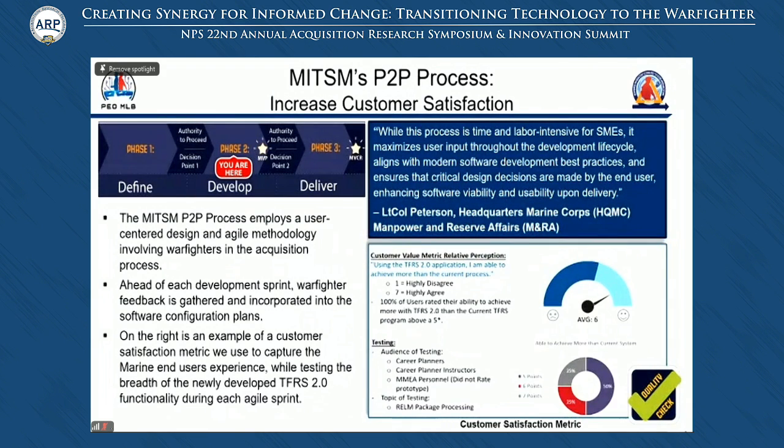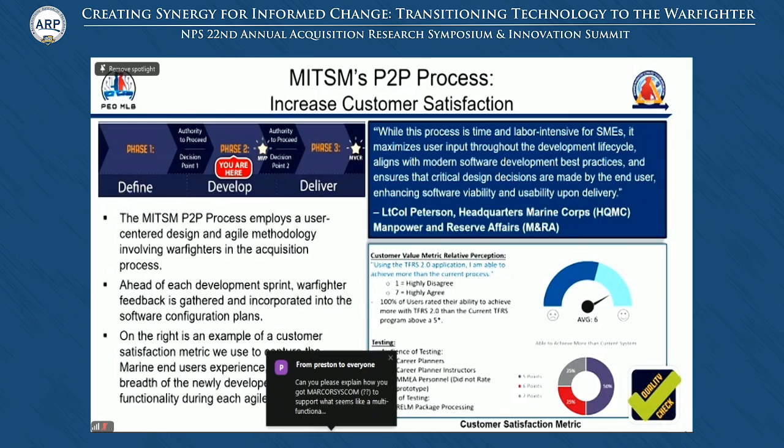So now we move to the develop phase of the prototype to program process. In this phase, we have awarded our OTA and we are sprinting. We follow a user-centered design agile methodology, which means 1 to 2 sprints ahead is the design sprint, where we wireframe with the Marine SMEs before configuration.